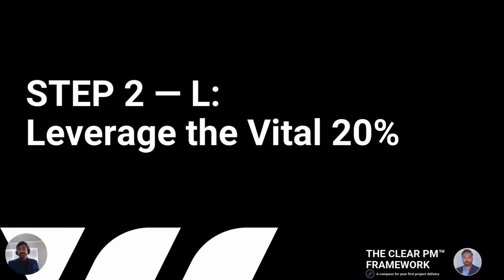That we can consider, but if you go back to the definition that we discussed as a part of clarity, I need three things: a website should be running, the customer should order and pay, and my team, a bakery person, should fulfill that order. So if these things are there, that is my 20%.